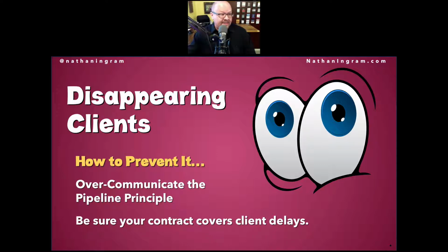Doug is asking, do you send a heads up email when you hit an enforcement milestone? Well, that's what the Friday emails are about, right? We haven't heard from you for 3 weeks. And if at the end of next week we still haven't heard from you, your project will be considered suspended and the remaining balance of the project will be due. So that's what the 3-sentence email on Friday is for. That's when you do that.